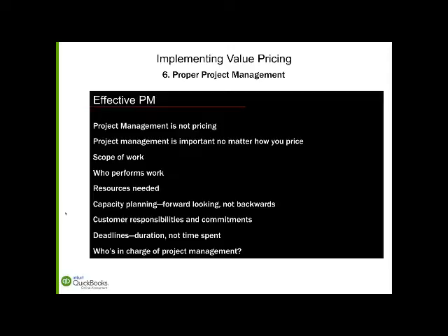Maybe you didn't know what you were doing. Maybe this was the first one you did, whatever. But if you're within plus or minus 50%, who cares? That's not what keeps the project manager up at night. What keeps the project manager up at night is, why did that file sitting on your desk that we estimated needed about a day's worth of work to finish, why did it sit in the office for 4 weeks? That's called duration. And that's what a project manager sweats over.